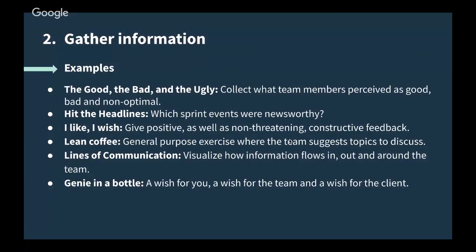Lean Coffee, we used this one yesterday with the commerce team. It's another general purpose exercise where the team is the one that suggests the topics to discuss. Basically, you ask people to list things they would like to discuss, and then you vote on which topics to discuss later in the next part of the retro.